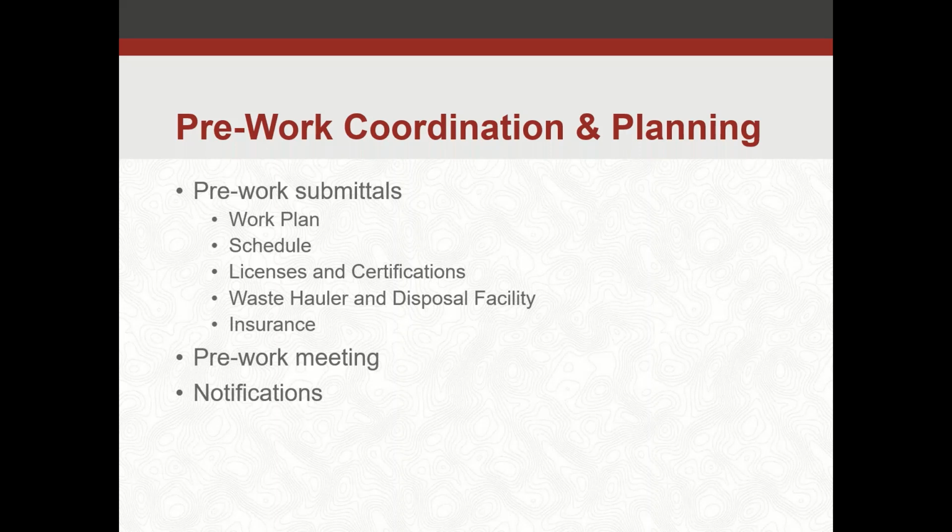Once you get into remediation and abatement, you've got a section of the building or the property that's controlled as the work area. So you need to make sure that once we go, you can give up that area for the amount of time it's going to take to do that remediation and abatement, and everyone can work around that schedule and coordination.